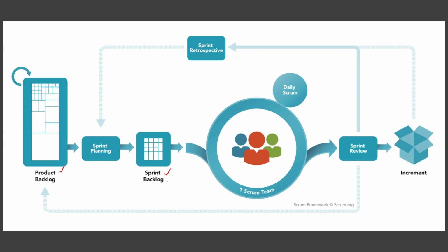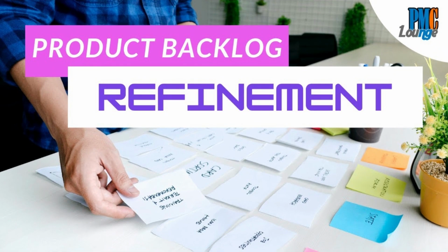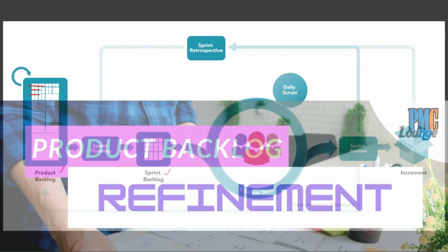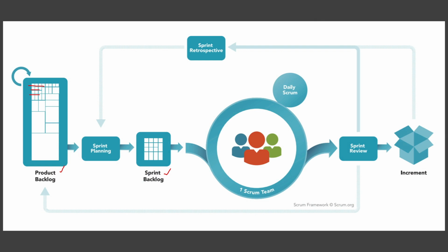But what I'm trying to say here is backlog needs grooming and refinement. Basically, your product backlog needs to be reviewed on a regular basis, and we actually have a specific meeting just for this. It is known as the product backlog refinement meeting, PBR. So this is something that the product owner is responsible for, and what happens is, based on the priority, the near-term backlog items should have stuff like estimates and more details that can be helpful for the team.